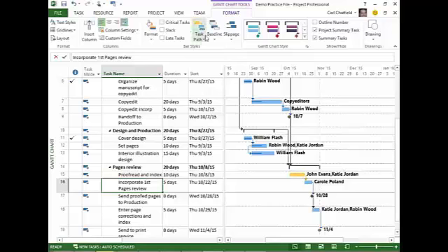And I may want to be even more specific and show driving predecessors. So these would be the predecessor tasks that directly schedule their successors. In other words, as we like to say, they have no slack or float in their task relationships. And I may want to make that distinction. And I can do the same thing for successor relationships as well.